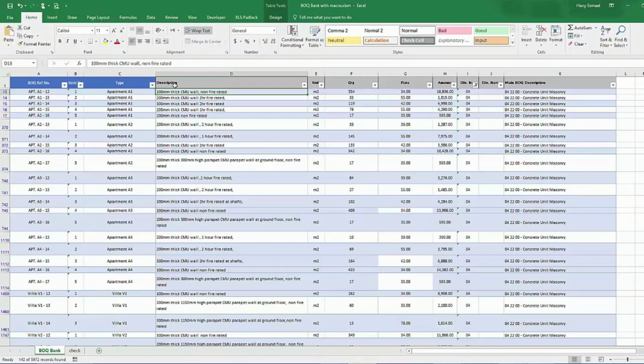So we cannot repeat this 3-0 for 2 different activities. It should be one control ID for one activity. However, we could define here many keywords for one activity, and we have here the condition as we discussed before.